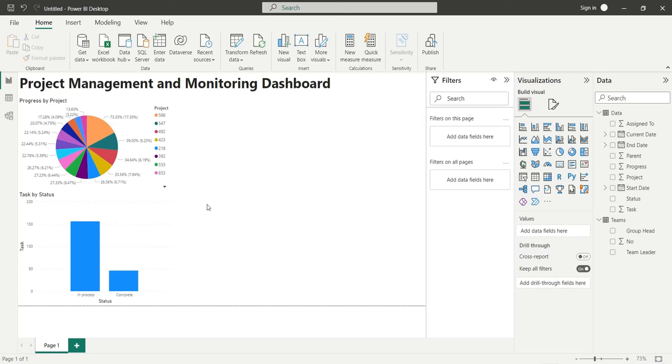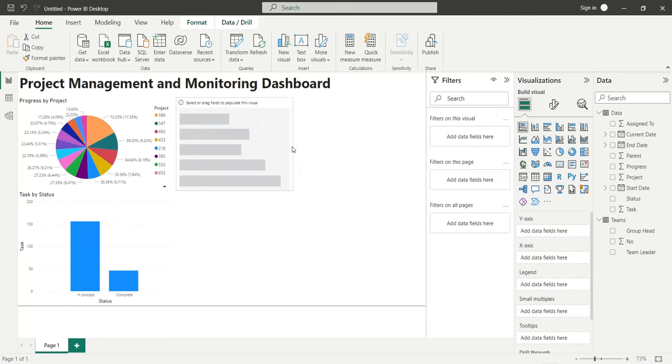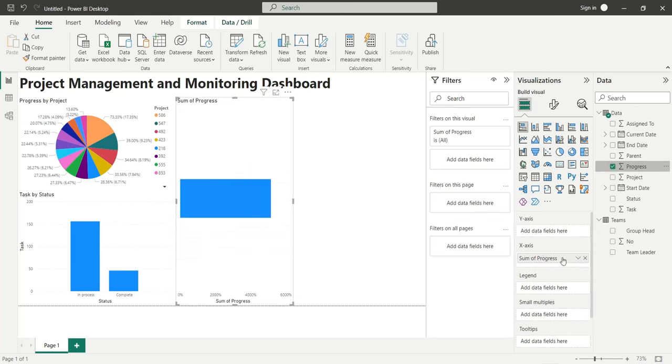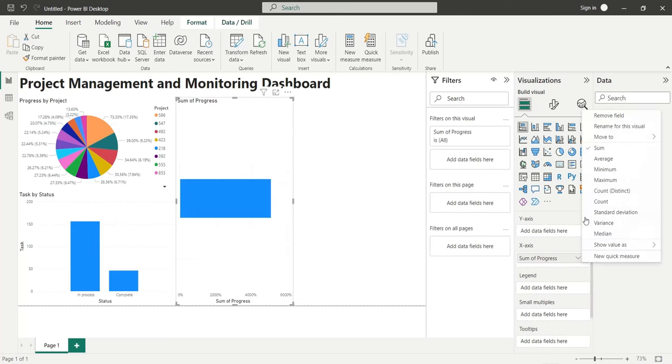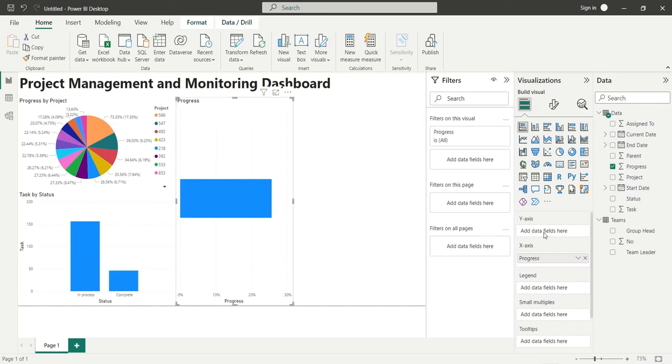Add a bar chart to the dashboard to display progress by team leader. Add the progress field to the x-axis as average. Add the team leader field to the y-axis from the teams table.